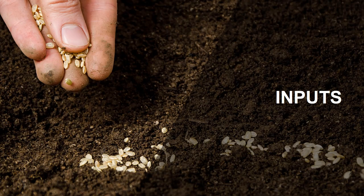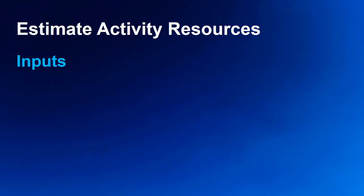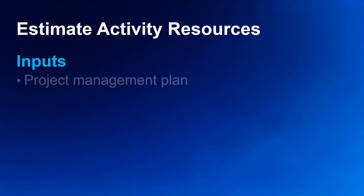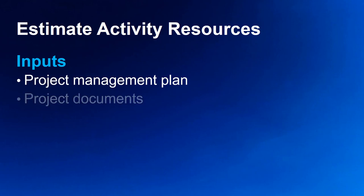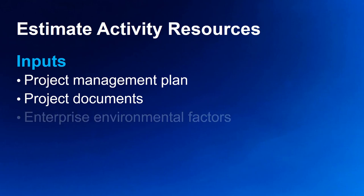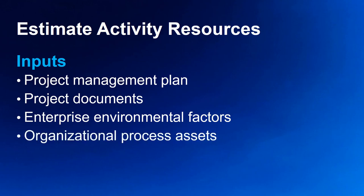Let's start with the inputs to the Estimate Activity Resources process — we have four of them. Within the project management plan, you'll need the resource management plan as well as the schedule baseline. Enterprise environmental factors such as resource availability, location, and skill can all influence resource selection. Organizational process assets can also influence or impact resource use — most common examples are policies or procedures that address staffing, the rental or purchase of materials, equipment, and supplies.